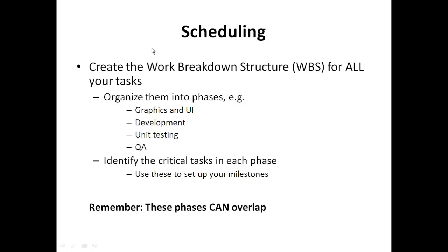Now, once the design is ready, like I said, we start the scheduling. The first thing we need to do is create the work breakdown structure, or what we popularly know as the WBS, for all the tasks. And here I mean all tasks, every small and big task. Do not exclude anything, even if it means resourcing some hardware or something like that. We do not ignore those. Put everything into your WBS.